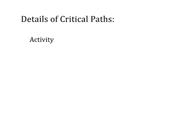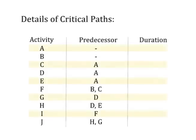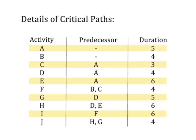When you're using the Critical Path Method, you need three pieces of information: activity, predecessor, and duration. You need to have the activities listed, you need to know which activities are predecessors to other activities, and then you need to know the time that each duration will take. In this instance, we're going to use weeks as our unit of time.